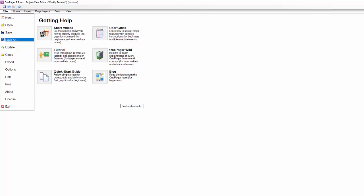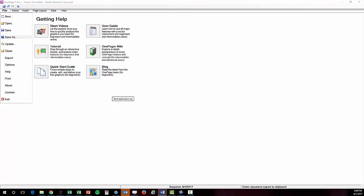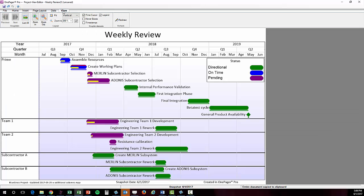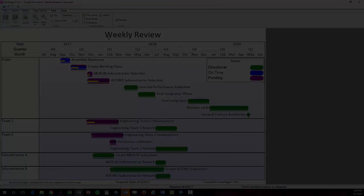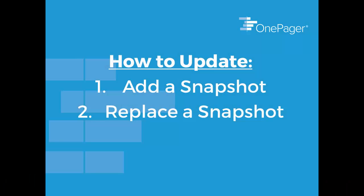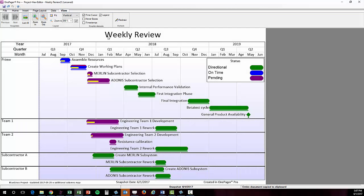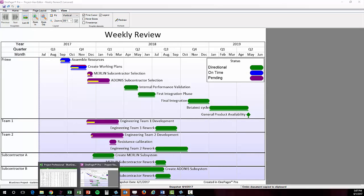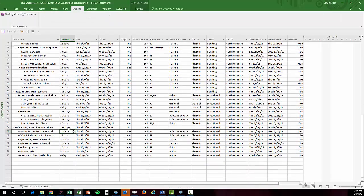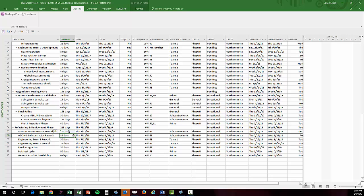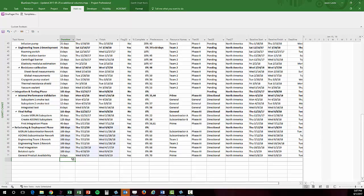One of the best things about OnePager is that it allows you to set up a visual for a recurring meeting and then simply use the source file to adjust the chart whenever your next iteration of that meeting occurs. There are two standard ways to update your visuals in OnePager: by adding a snapshot to a project view or by replacing an existing snapshot. First, let's pretend that we've just presented this visual to an audience that we'll know we'll have to present to each week for the next several weeks. Now, a week is going to go by and some change is going to be inflicted upon our source file.